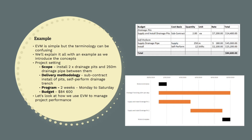Let's imagine an imaginary construction project to install a new subsurface drainage line. The scope is to install two drainage pits and a 250 meter subsurface drainage pipe between them. We choose to deliver it by subcontracting out the installation of the pits to a specialist subcontractor and self performing the drainage pipe install. The work is anticipated to take two weeks working Monday to Saturday and we have a budget of $84,600 to complete the works.